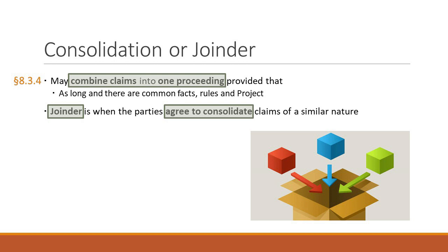So now I'm potentially faced with a fact where my client may have to arbitrate the same case twice and potentially have different outcomes. In one case, the arbiters for the architect may say, maybe the architect screwed up, but they were only worth 20% of the screw up, the other 80 is the contractor.